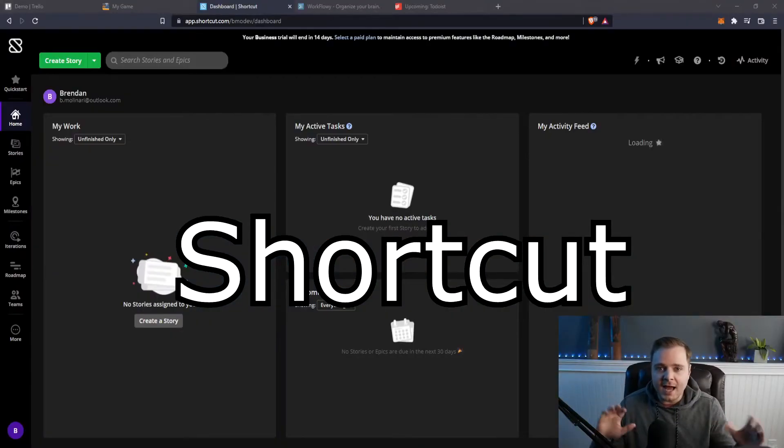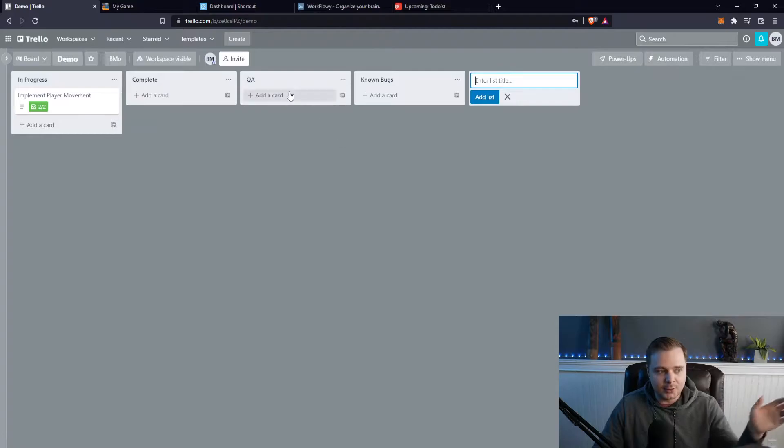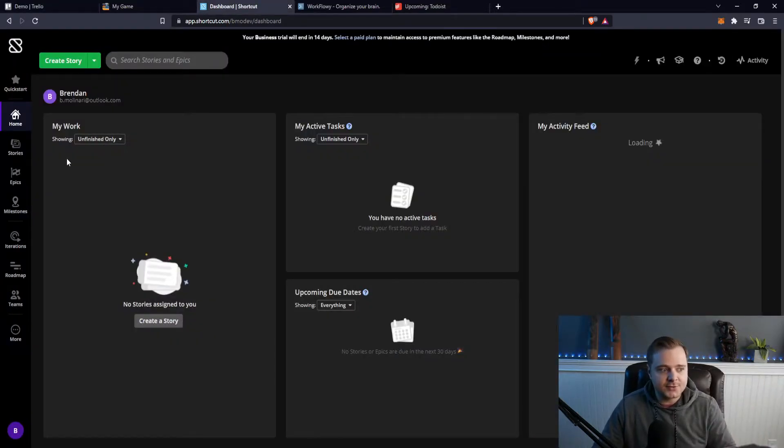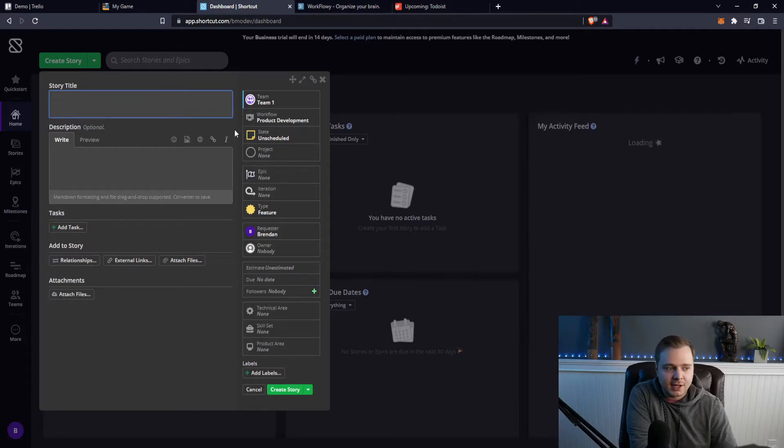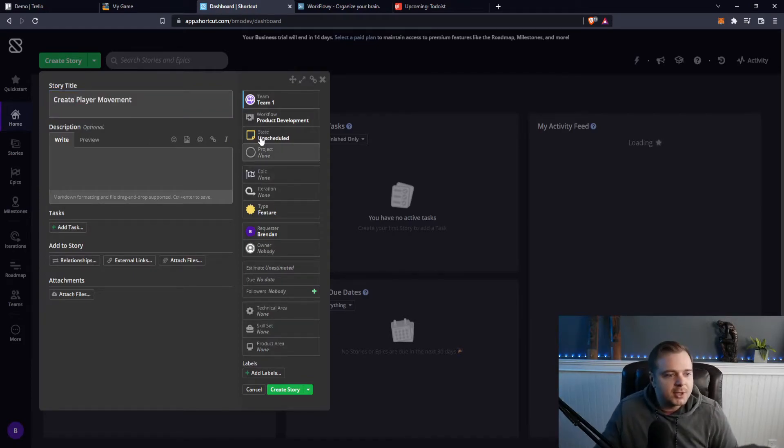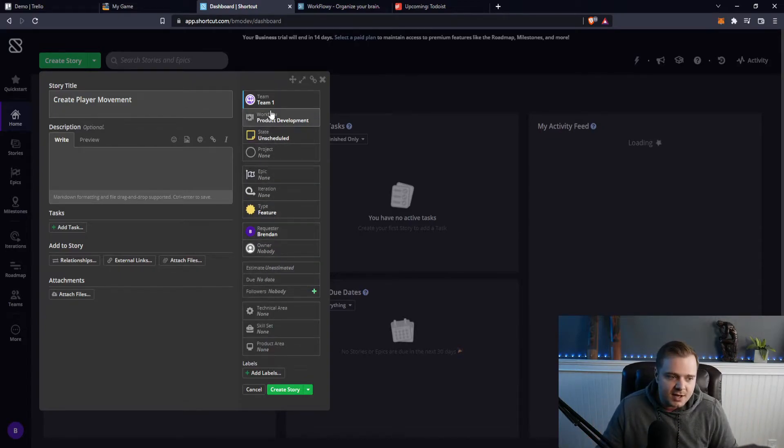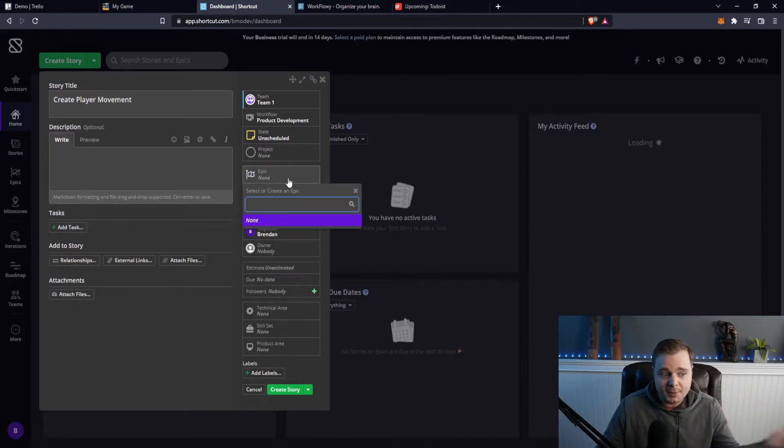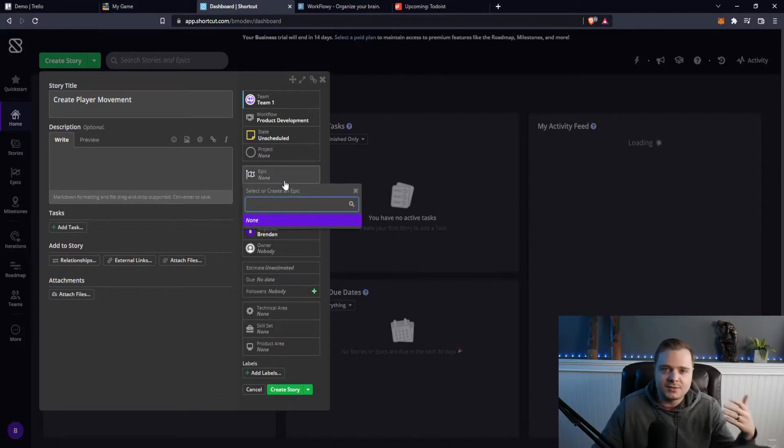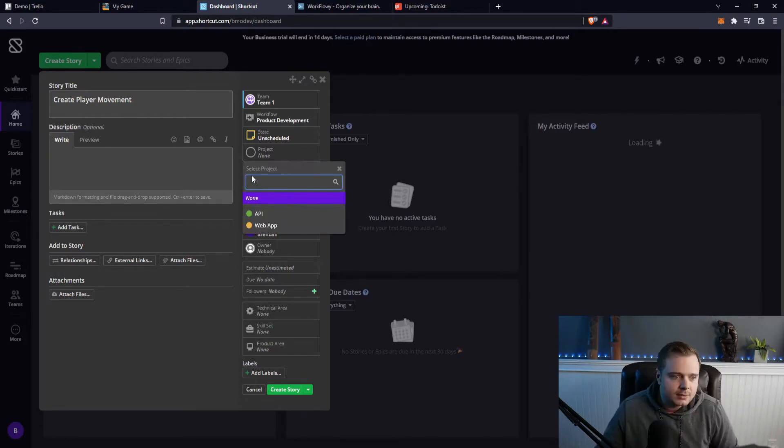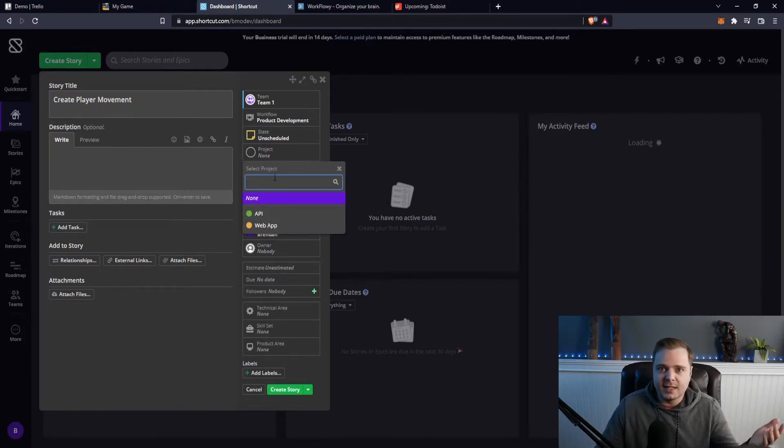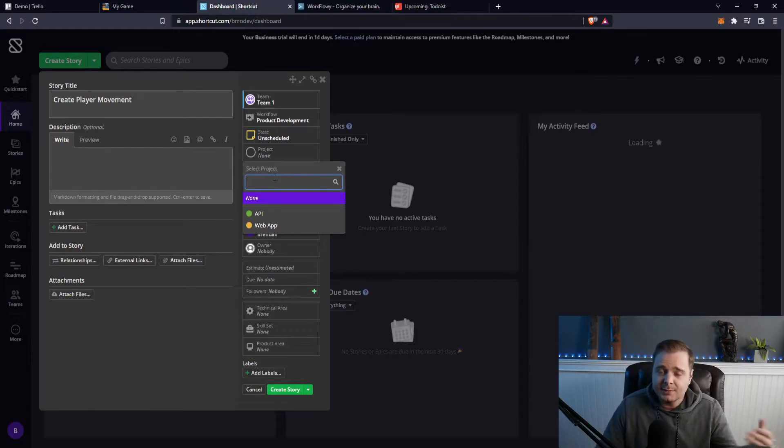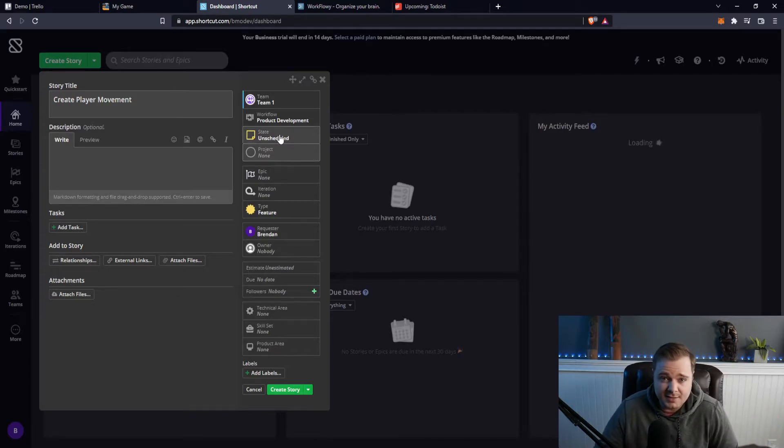And so Shortcut has the aspects of Trello where you can make cards. So I could create what's called a user story here and this could be a similar thing, like create player movement or something like that. But you get a lot more team breakdown here. You have all these tabs on the right hand side where you can break this down into epics. So maybe the epic would be player movement and there's 100 different user stories underneath this epic. You can assign this to like the back end team as opposed to the design team or the product team or your art team or your QA testing team.